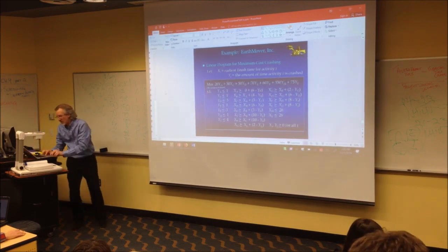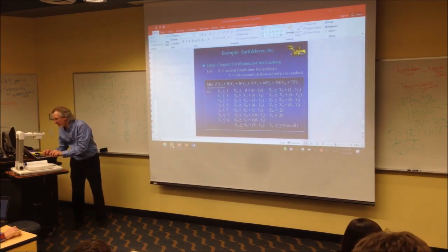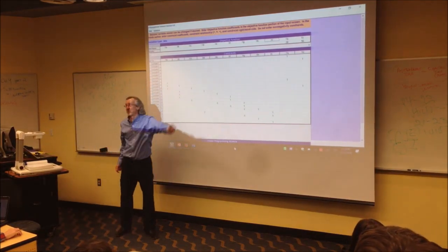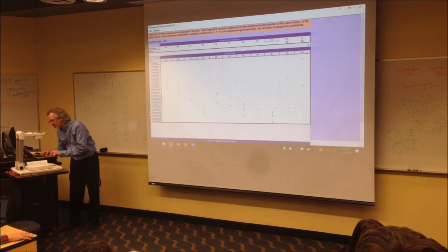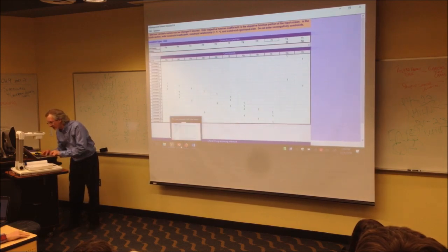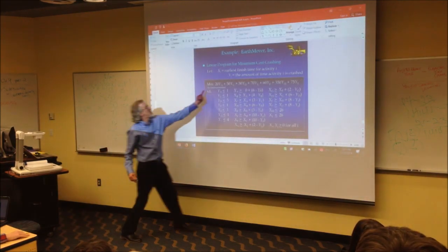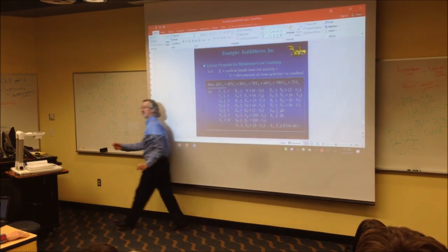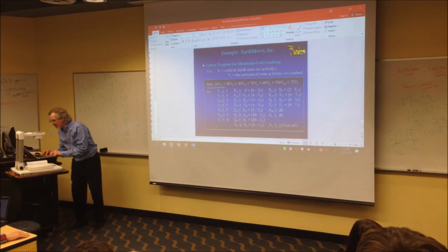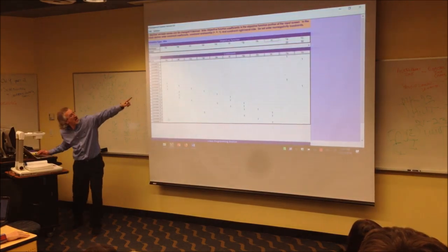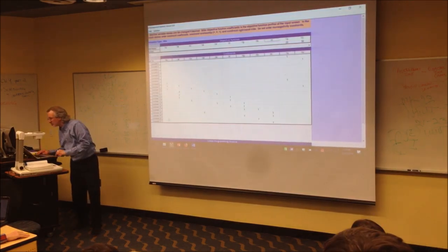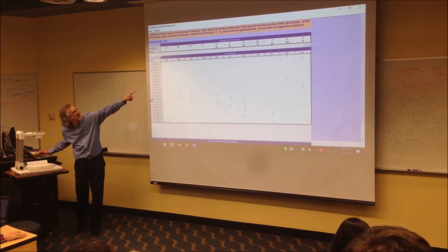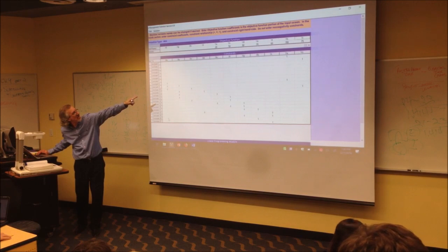And when you do this, it looks like this. Here's all my x variables in the objective function. Why are there no numbers underneath it? Because the objective function doesn't use any of the x variables, only the y variables. So let me go back. Look at the y. Y sub a has a 20. Y sub c is a 50. Y sub d is a 50. E, F, G, H, I.